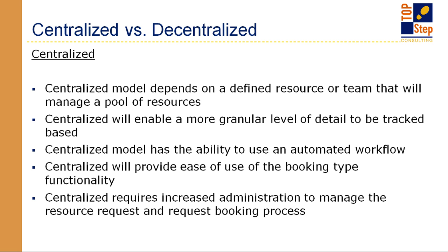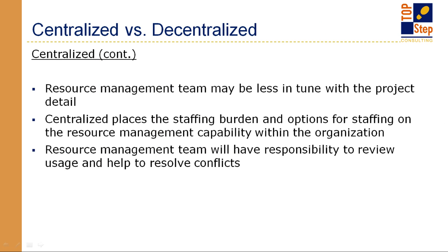In this, there's a bit more administration around using a centralized process, because there are more people involved in that process typically. The one thing that we have heard around centralized processes is when you have a resource management team, they may not be as in tune with the project details as a project manager would be. So that's something to definitely think about. Also, it's a little bit more burdensome with the amount of data and the amount of people involved, but it really depends on what you're looking to do.